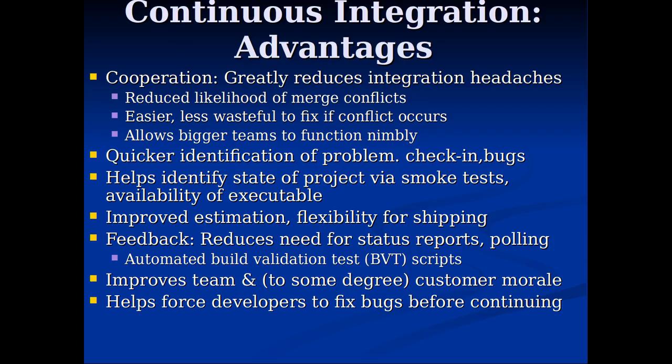It turns out that one of the best senses of where we're at with this project is to look at the outputs of this continuous integration, the builds that are occurring. How many builds have occurred in the past day? What have they involved, etc. So it gives you a sense of the progress of the project.